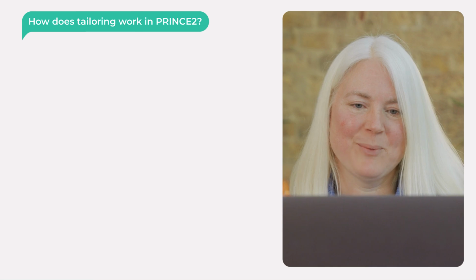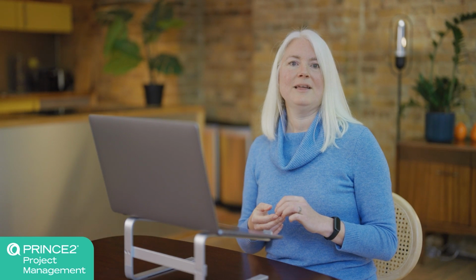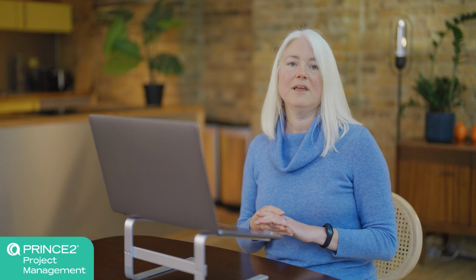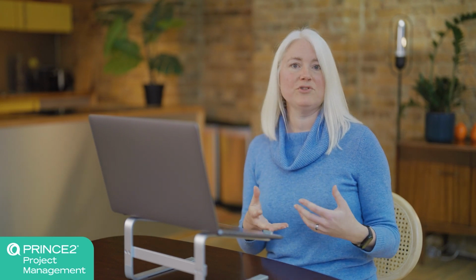So our final question, how does tailoring work in PRINCE2? Tailoring to suit your project is one of the principles of PRINCE2, and you can tailor pretty much anything you like to whatever is appropriate to your project. The only thing that we can't mess with are the principles themselves, but how we apply them is really up to you and your project.